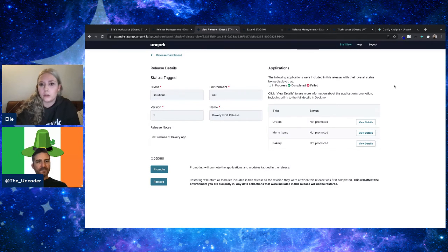Yeah, look, I think generally everyone's always going to strive to be pencils down a little bit before the release, right? You're obviously going to increase your risk the more changes you're making closer to your release time. So let's say you're in a situation, as you're saying, Elle, where we're done on Monday, we tagged the release, and it's going to be deployed on Thursday, right? You want to give yourself some time. You want to be code complete, so to speak, on that release.